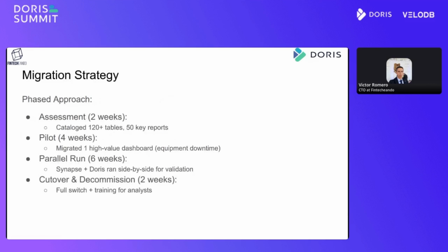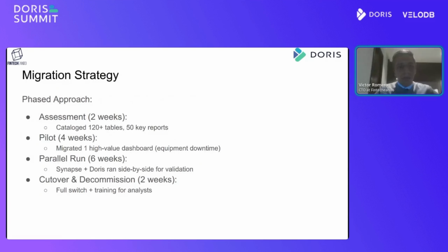This is the migration strategy that we have followed. We made an assessment that took 2 weeks. It helped us to assess the tables and the key reports that we need to migrate. We implemented a pilot because we needed to validate which downtime we would need to take for that swap of technology.